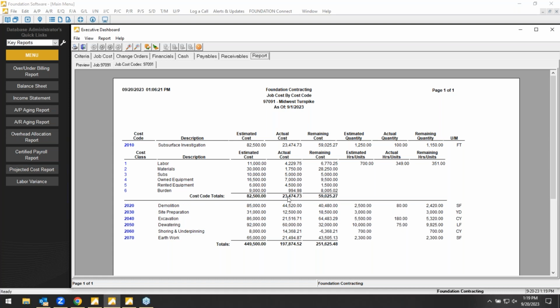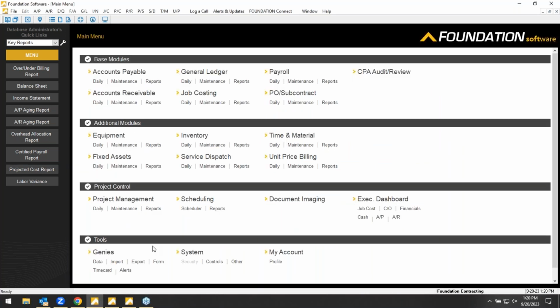So truly accuracy on job costing, that burden, it's a pretty good chunk of the expense. That would allocate to the penny by following the labor to the job and that cost code. So labor and burden are allocated by way of payroll. Material and subcontract costs are allocated by way of accounts payable. And you can issue POs and subcontracts through our system as well, apply the invoice against it. That is no problem.